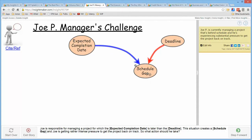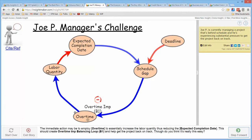And then I ask, what does the schedule gap end up influencing? Well, there's an option for working overtime. And working overtime increases the labor quantity, which should reduce the expected completion time. And if I walk this loop, there's one opposite relationship in it, so it's a balancing loop.